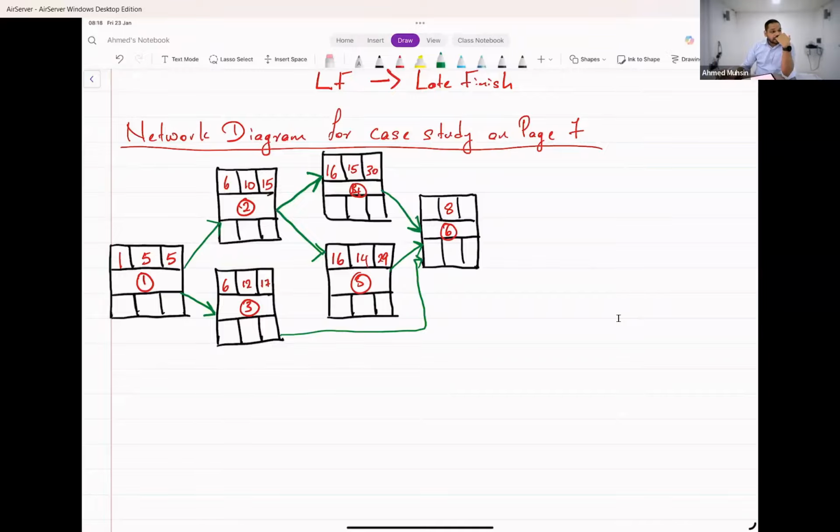Day 30, right? Earliest it can start, 3, 4, 5 have to finish. Day 31, sorry, I'm sorry. The earliest it can start is day 31 because all 3 of them have to finish. Task 4 is the last to finish, isn't it? So the earliest it can start is day 31, and then the earliest it can finish is 31, 32, 33, 34, 35, 36, 37, 38. Earliest it can finish is day 38. So we say day 38 over here.